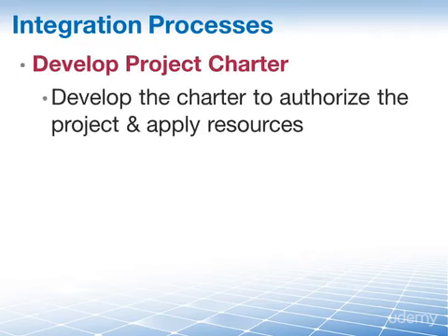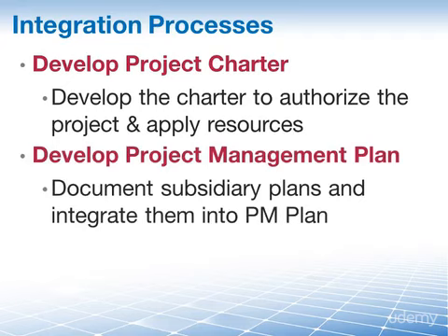The process is Develop Project Charter, and the intent is to get the project going, because this is the process of developing a document that formally authorizes the existence of a project and provides the project manager with the authority to apply organizational resources to project activities. Once we have that out of the way, we begin planning. We begin with the Develop Project Management Plan process. That's the process of defining, preparing, and coordinating all subsidiary plans and integrating them into a comprehensive project management plan.